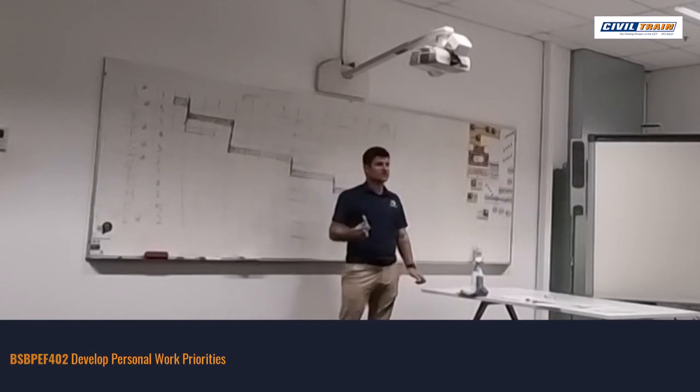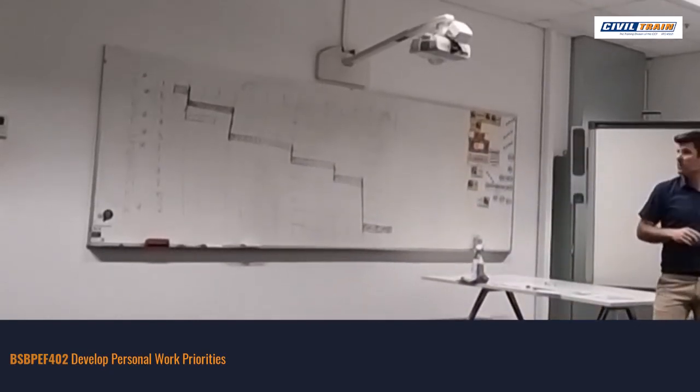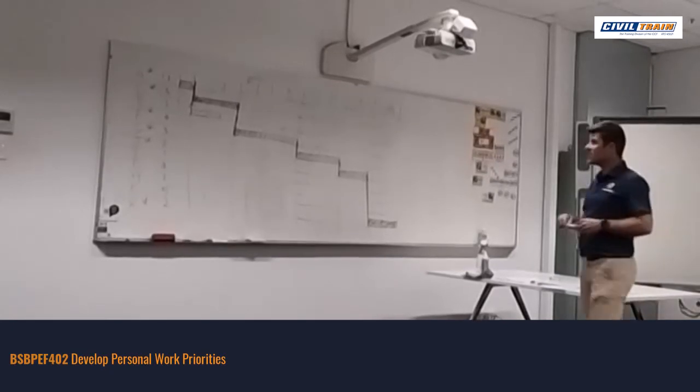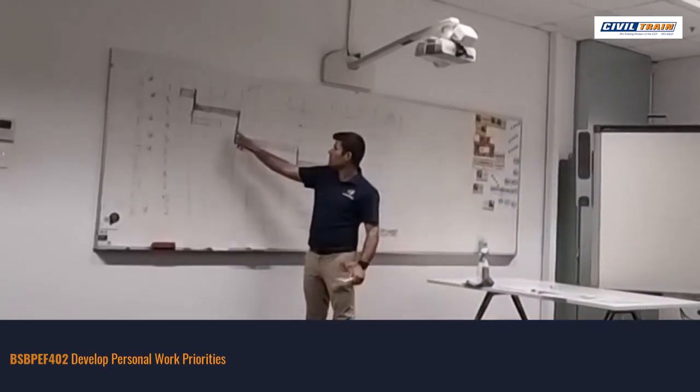What's that telling me? I call it a floating task. That's the time I've got to do it. I can't start it any earlier because of the arrow, it has to start after, but it's telling me that I've got a day up my sleeve. I can slide that way.